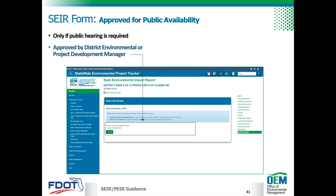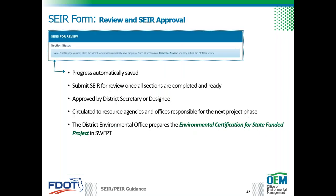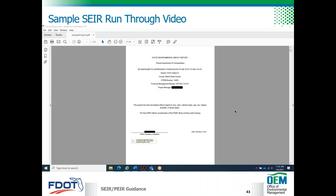For projects where documents need to be displayed for public availability such as for a public hearing, an option for public availability review can be selected. The district environmental manager or project development manager will then sign the form electronically to accept the project for public review. Once the SEER is completed and documents uploaded, the district environmental or project development manager will certify it and submit it to the district secretary or designee for approval. Once approved, it's circulated to those resource agencies and offices responsible for the next phase.